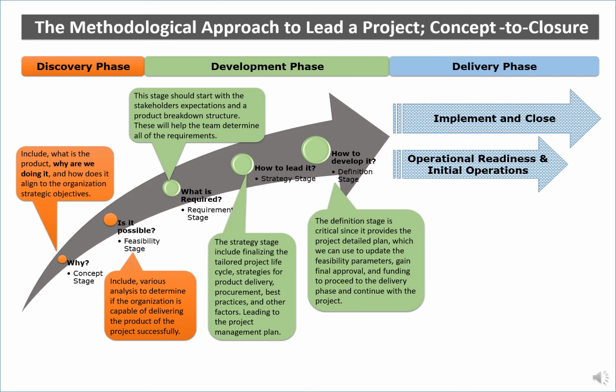So in parallel to implementation, let's say we're talking about building a museum, while the team is building the museum, you have engineering construction people doing the engineering design and then implementing and basically constructing the museum. We should have operation people working in parallel to get ready for operation, and that could include the displays that will be presented in that museum, the writing, the marketing materials, the IT system, the recruitment, the hiring, the training of the personnel, so that once we are ready to open, those people should be in place and they should be qualified and trained to do what's required of them.